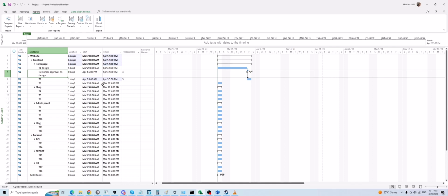Your project plan should represent what is going to happen on your project. If you miss this approval in your project plan, most probably you're not going to ask the customer to approve it. And most probably you cannot defend and claim the delay, especially when the delay happened and there is an argument with the customer about why this delay happened.